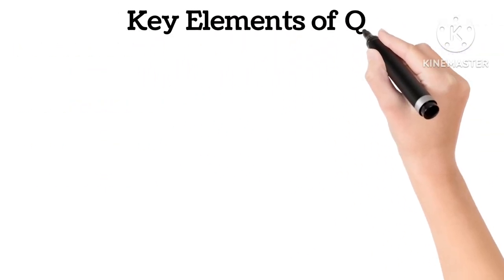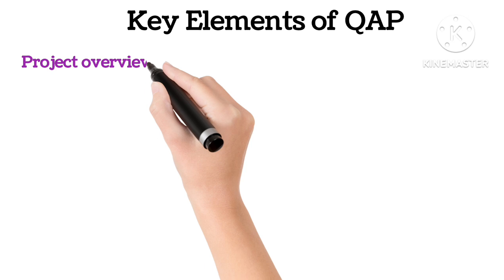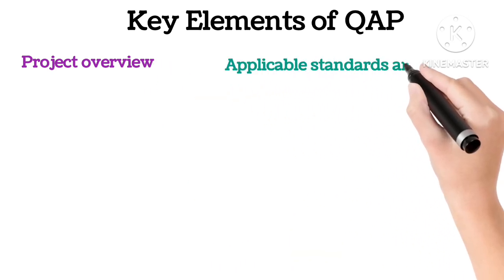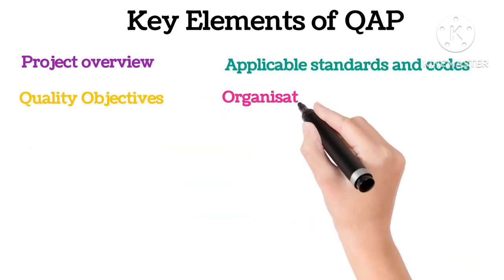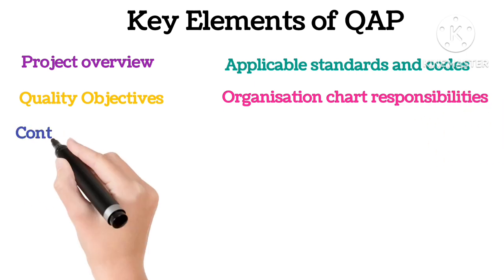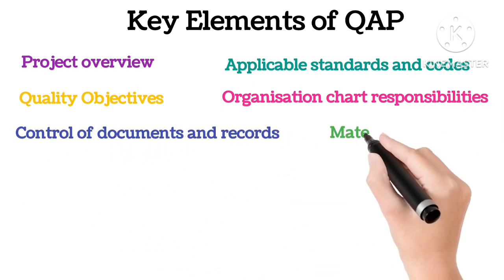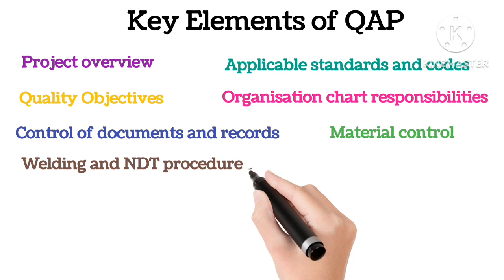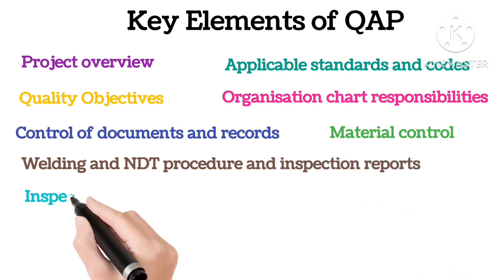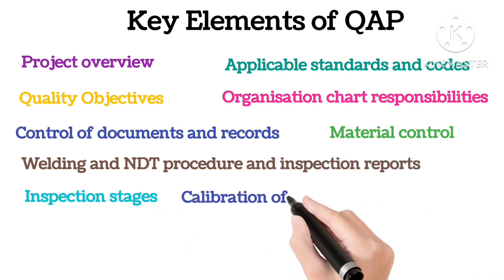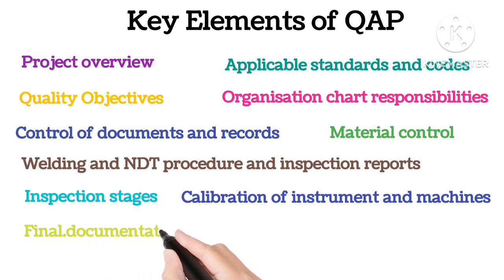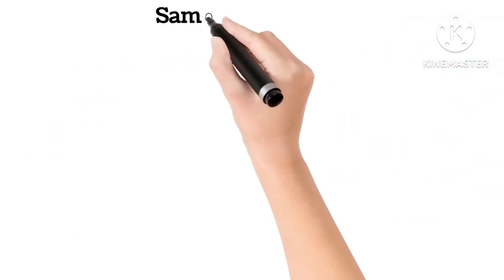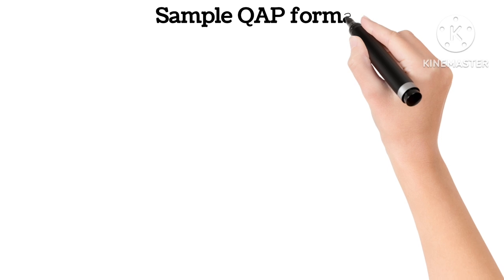Key elements in QAP: project overview; applicable standards and codes; quality objectives; organization chart and responsibilities; control of documents and records; material control; welding and NDT procedures and inspection reports; inspection stages; calibration of instruments and machines; and final documentation. The QAP is usually approved by the client and followed throughout the project life cycle. This table helps everyone understand what to check, how and when.